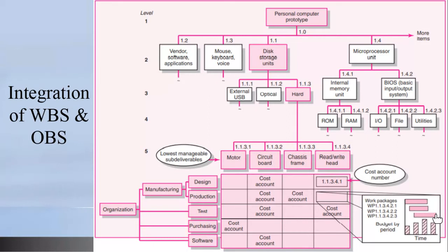The only thing now is that rather than having this cell, you would perhaps have another cell down here outside of the organization, because all of these suggest that you are getting these resources from within the organization where you are doing the project. Supposing that was not the case, and you are getting additional support from outside the organization, you would put another cell below software, for example, indicate the name of that resource and state that it's external. You follow what I'm saying? Yes, sir.